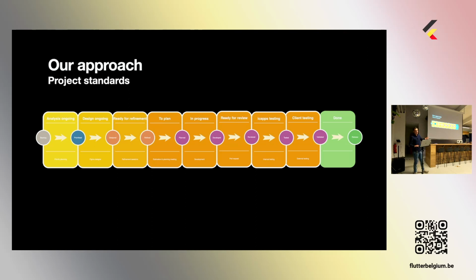And together with designs, you also need user stories. I will go deeper into that later on. But going through the flow, we go from design ready to refinement sessions, to planning, progress, reviewing, testing, client testing, to done. It's a cycle we try to iterate through every sprint, or sometimes every day. So we noticed if we really followed this approach, our quality went up.